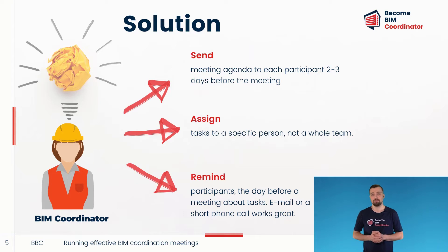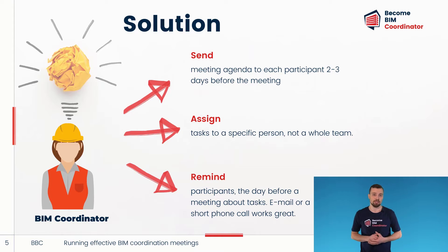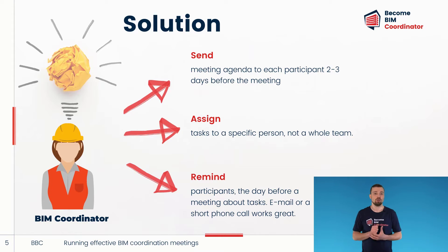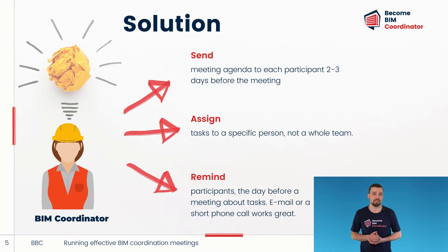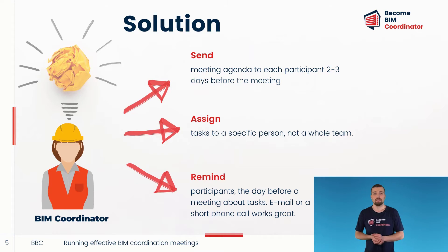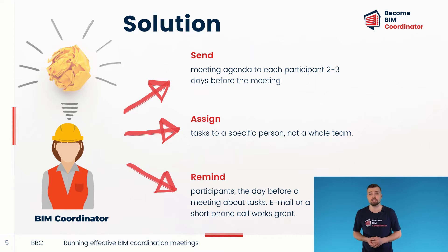Here's an important tip: don't assign tasks to the entire department, but rather to a specific person. For example, if you need the structural engineering team to prepare something for the meeting, appoint a specific person from that team to do it. This way, there can be no excuses like, 'I didn't know that I had to do it.' Another good practice is that the BIM coordinator calls or sends an email to that person the day before the meeting with a reminder of what you want them to prepare. It doesn't have to be a big deal — a short email or a two-minute conversation works wonders.